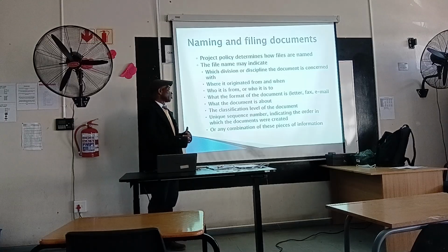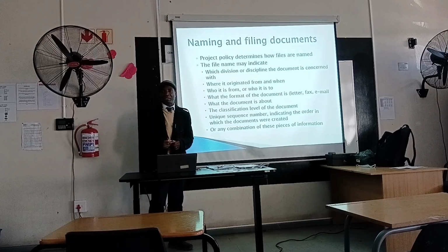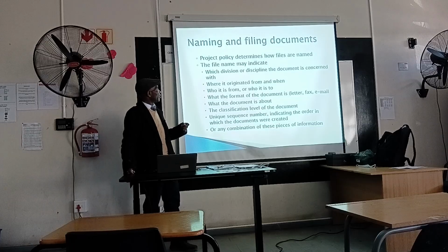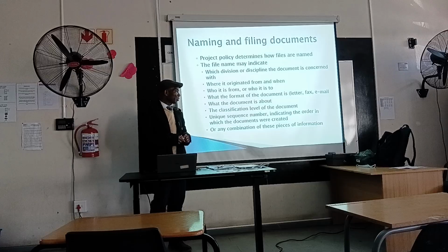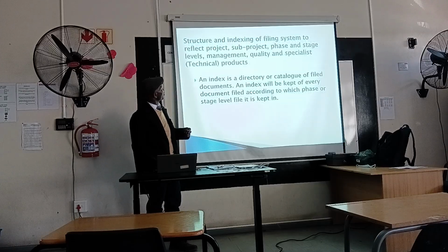Then the classification level of the document needs to be established, and a unique sequence number indicating the order in which the documents were created. All those things need to be agreed upon based on the policies of the project, as we said, or any other combination of this information.